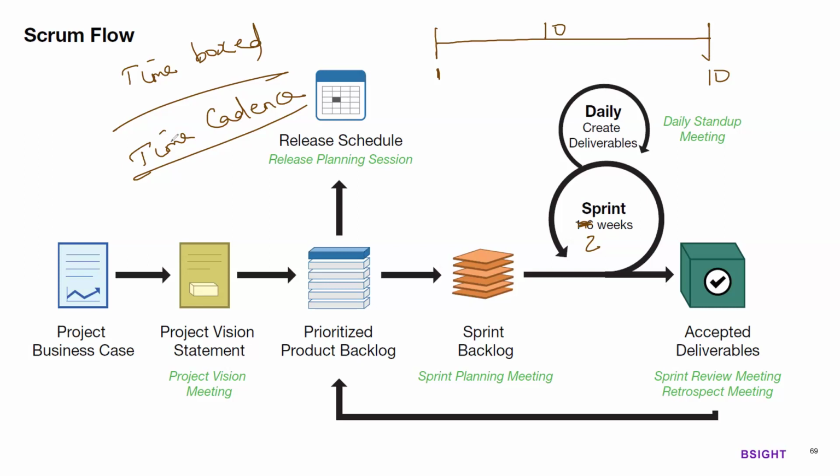You can't say, in this sprint we will do 10 items so 2 weeks, next sprint 5 items so 1 week, next 15 items so 3 weeks. No. If you fix the duration of a sprint at 2 weeks, every sprint will be 2 weeks. That is time cadence, that rhythm, that frequency will continue. Right?